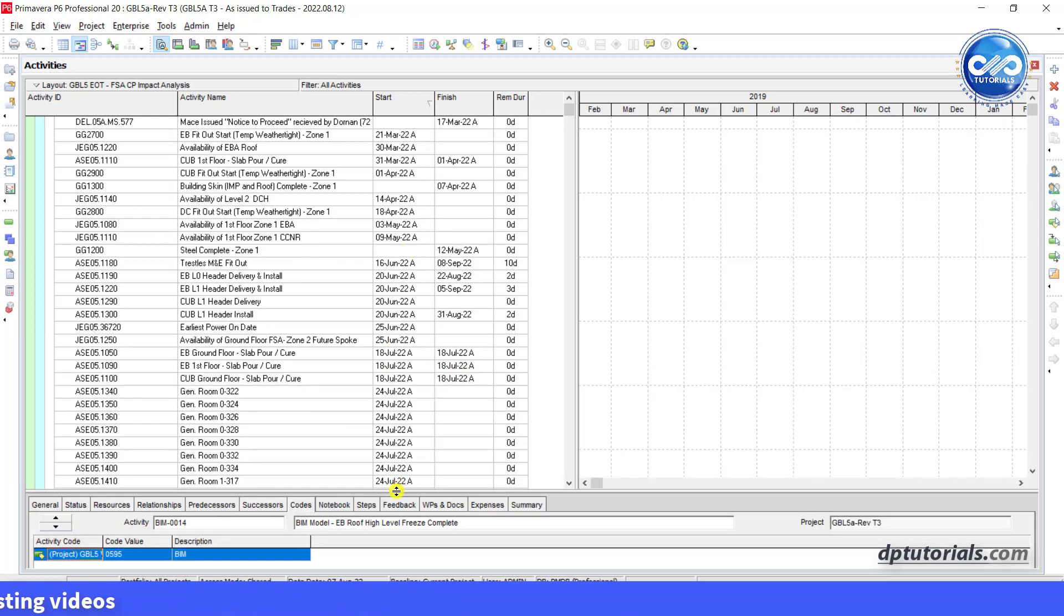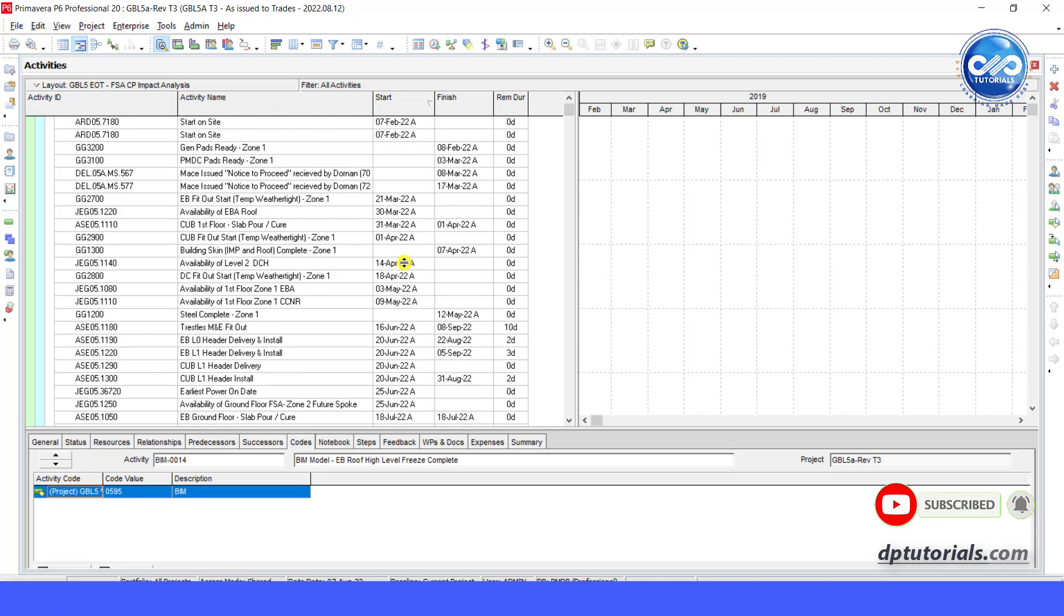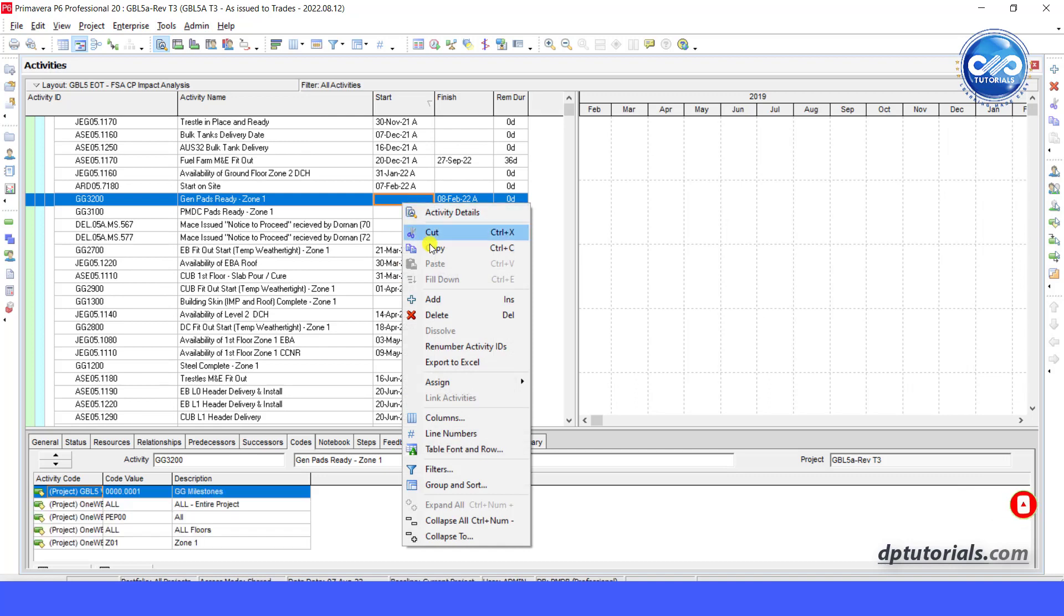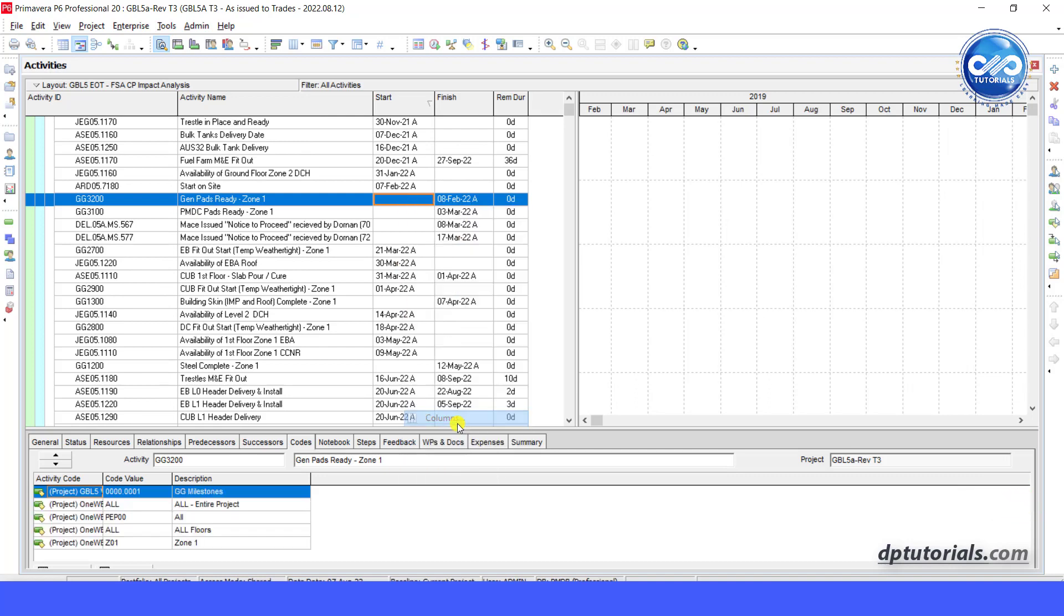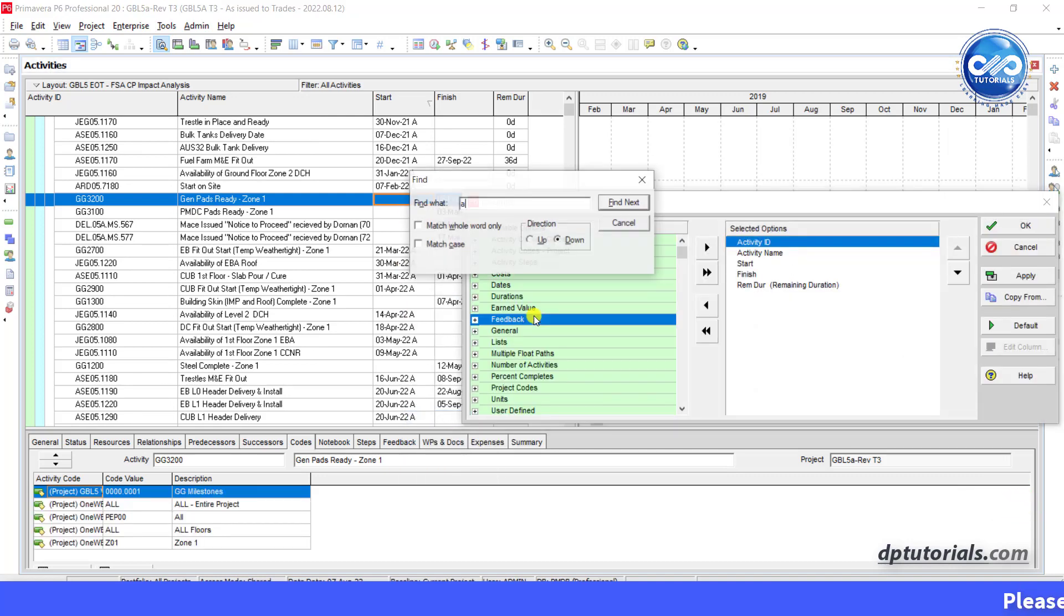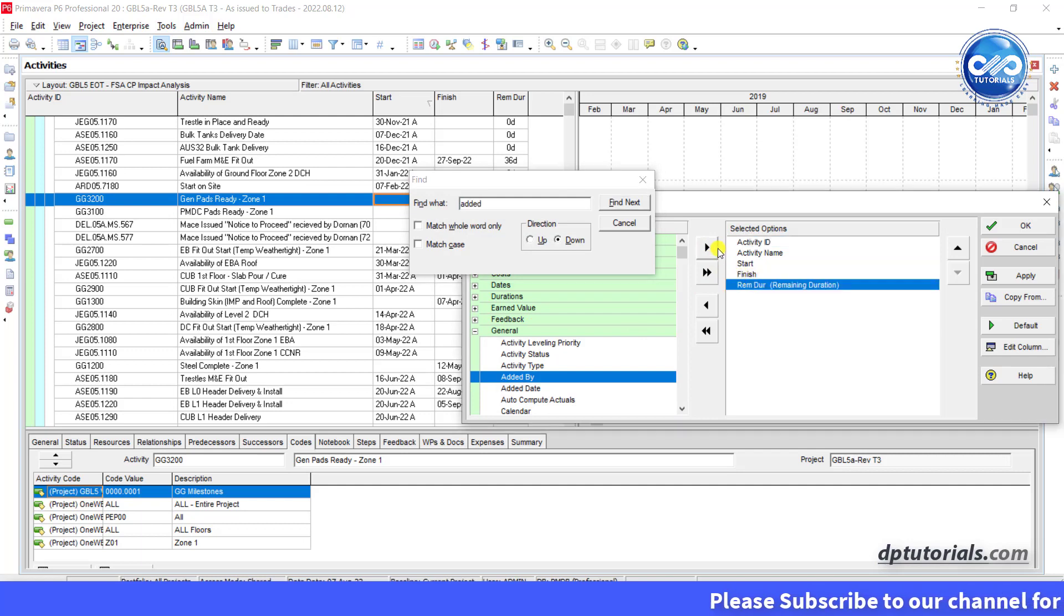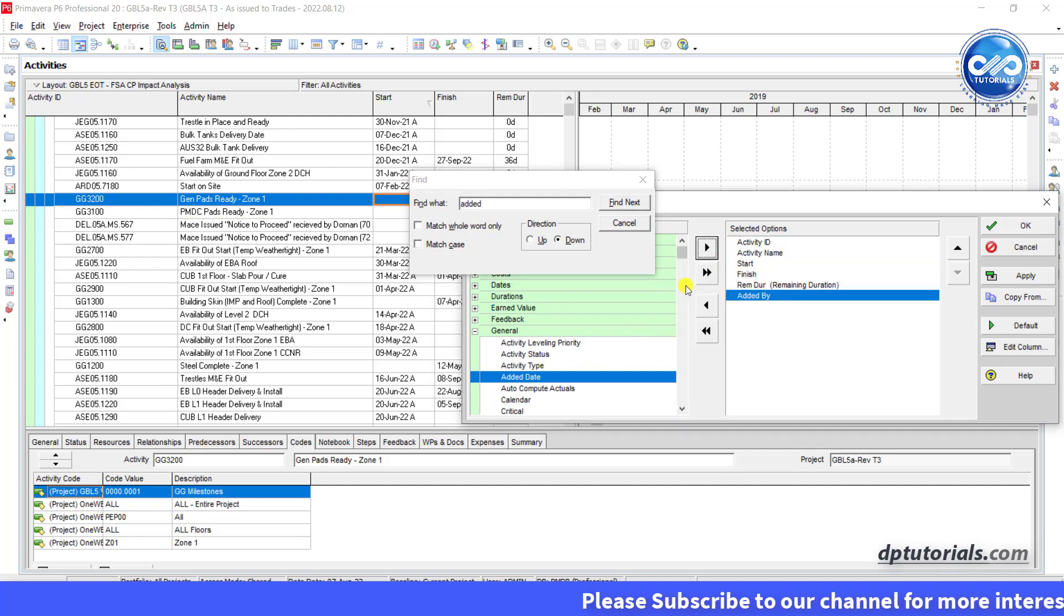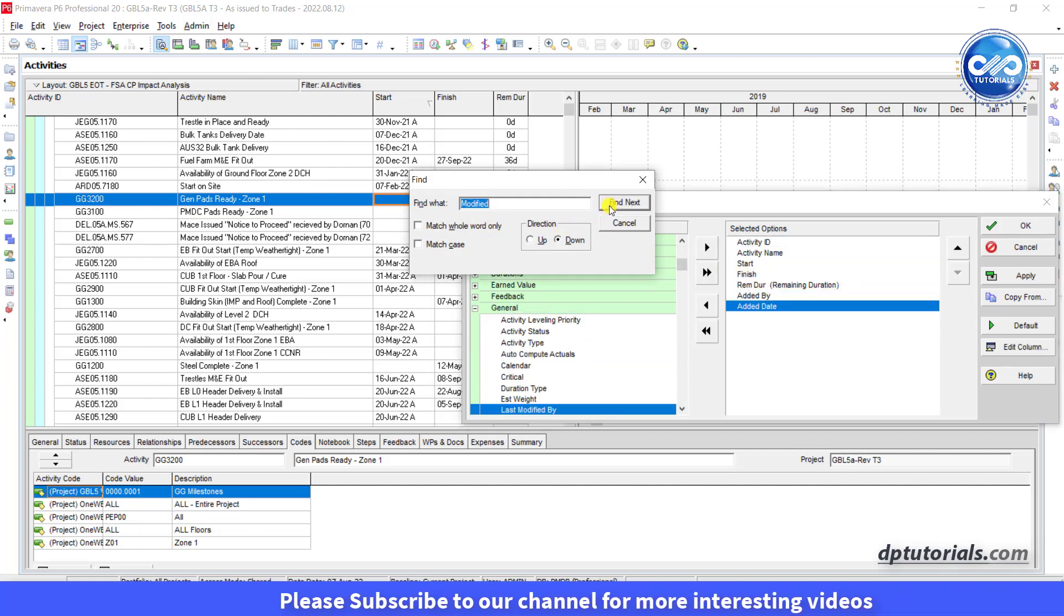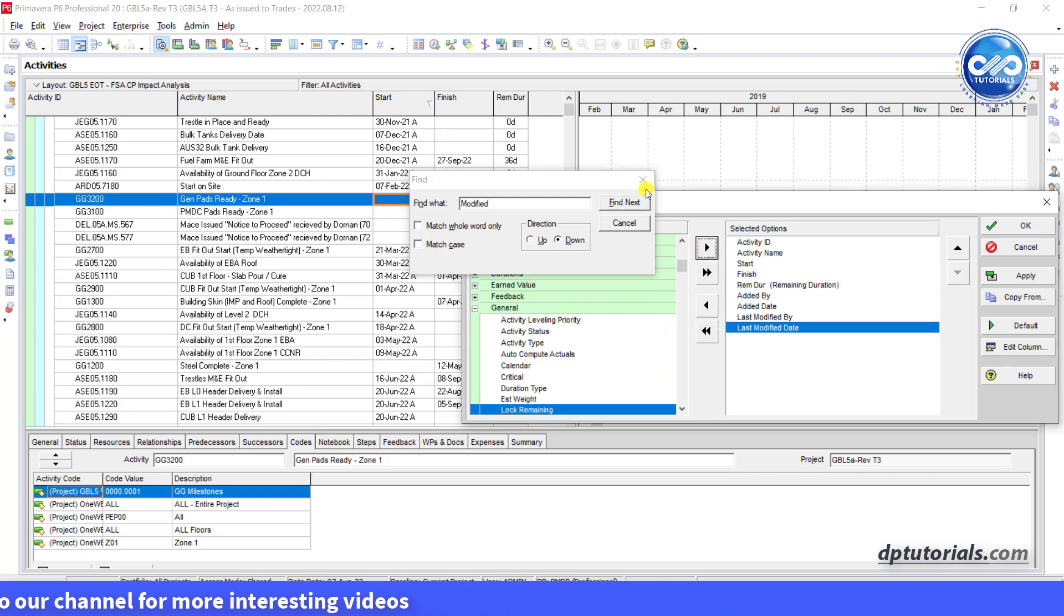Just in the project schedule, you need to add some columns. Right click in the activity table, select columns and then add: added by, added date, last modified by, and last modified date. And then click OK.